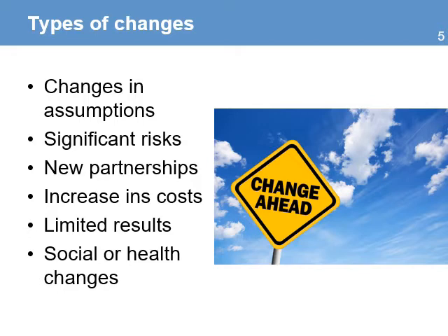Adding a partner requires changes to the scope, and you need to change the team responsibilities. Increasing costs due to inflation causes a reduction in the budget, and you need to propose a reduction in the scope of the project. The participatory approach is not producing the desired results. You need to make changes in the communications and stakeholder strategies. And even a global pandemic forces you to rethink the project evaluation, and you need to find alternative methods to evaluate the project.